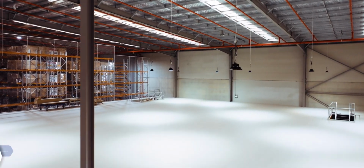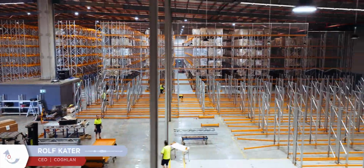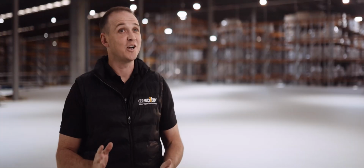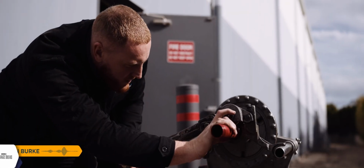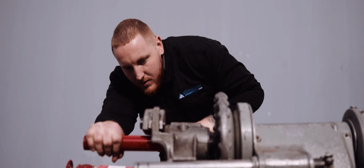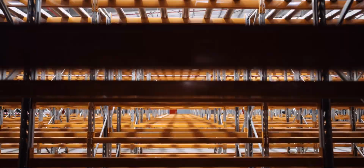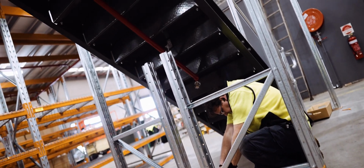In our mezzanine construction area, we have some interesting challenges along there around the fire regulations. It's not uncommon to be thrown a curveball by third-party contractors, and once again, it did happen here. Luckily enough, being locally manufactured, we're able to change that design principle, have it manufactured, enter site within 3 weeks, solving the issue and relaying no downtime for our customer. Completion date remained the same.